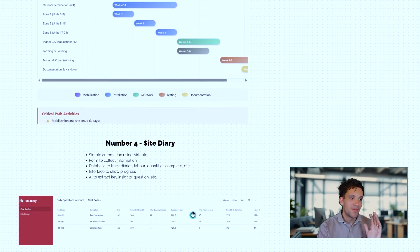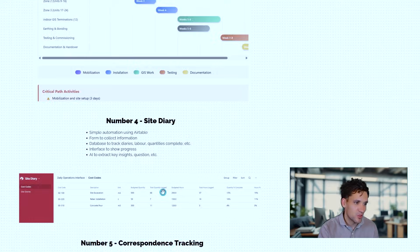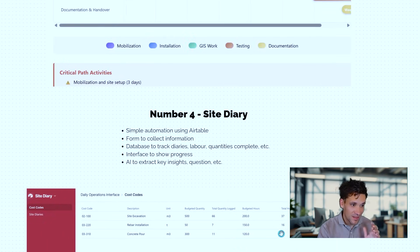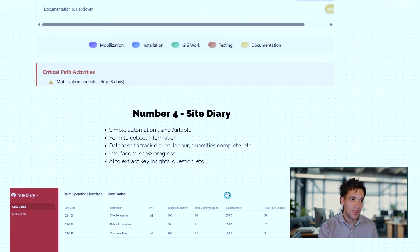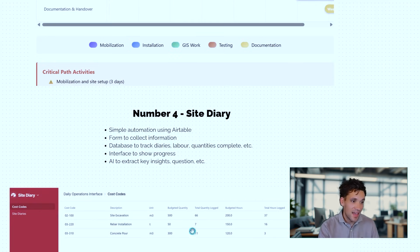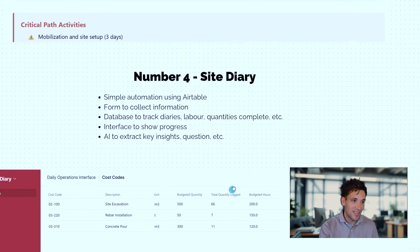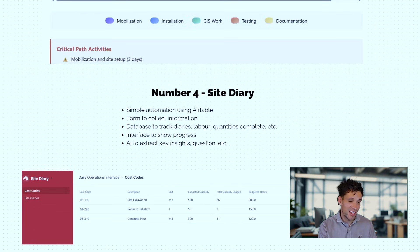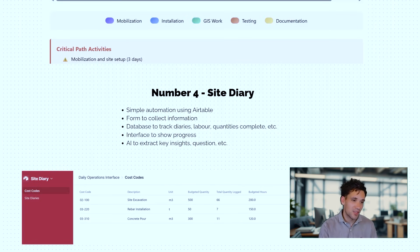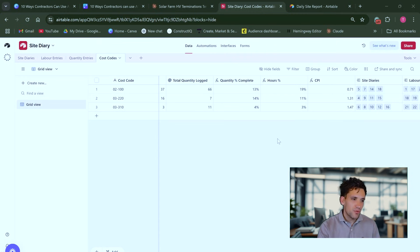Next, we've got a site diary. Now, this is more of an automation rather than strictly artificial intelligence, but I built in about 30 minutes a simple automation using Airtable with a couple of different databases and tables and a form to collect information and effectively recreated a simple site diary where you can enter what work was done each day, the weather, upload photos, and record all your progress quantities, your labor hours used, all your timesheets. And it took me about 30 minutes to prepare.